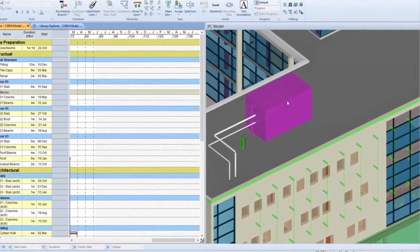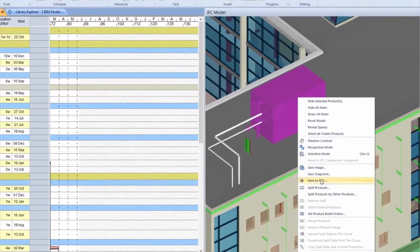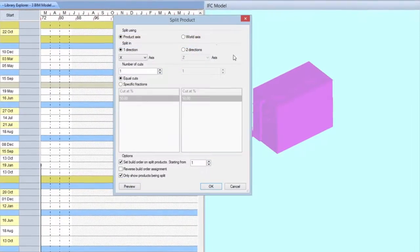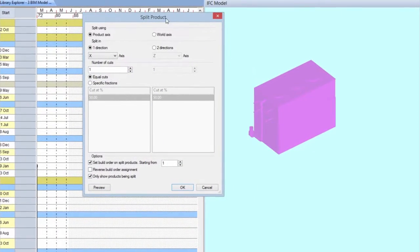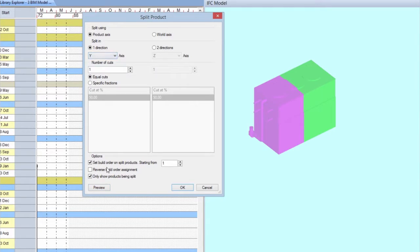You can separate IFC elements to reflect the way it would actually be built. You can split multiple times in three axes and merge items.